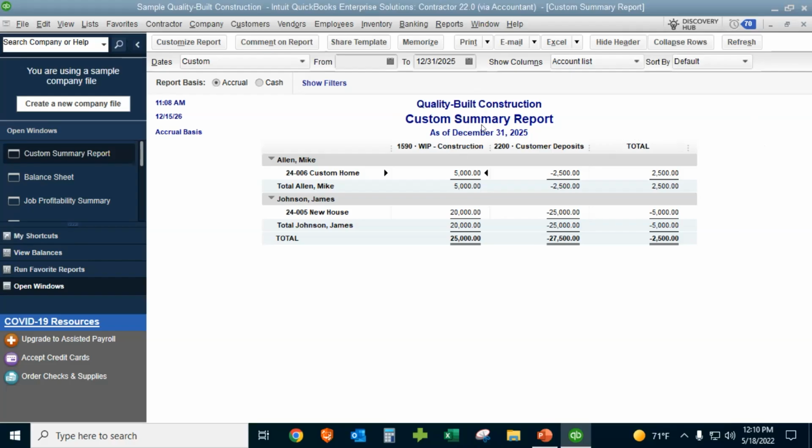And we also do this for some of the P&L accounts too. Yeah. So then I'll run a similar report like this and call it a closed job report, and I'll put the P&L accounts that we're using on there, so we can see in a format that shows the jobs going up and down rather than side to side, because it's easier to read when you're only looking at probably 4 or 5 GL accounts and you have 60 jobs. So it'd be a quick way to know what's hitting your, in theory, closed jobs, and what your profit leaking out the back door you might not be billing for. Yeah. Got it.